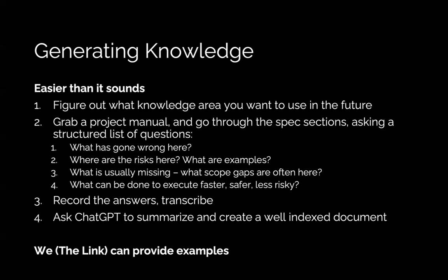One of the problems with knowledge management always is, how do you make it useful at the time of use? And indexing it against what project manuals are organized by just seems like an obvious way to do it. You don't have to do it that way, but that's just an easy one for me. So I encourage folks to think about what are some quality related issues, some safety related issues, some product issues, whatever it might be, where you might just sit there and do it yourself if you want, and literally record yourself going through it. Because once you've done that, you have the ability to upload it and apply it, or give it to other people to apply.